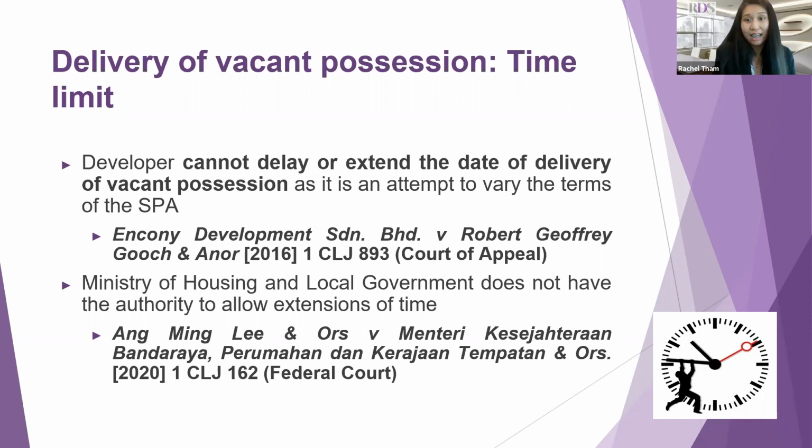The Federal Court held that the controller of housing does not have the power to grant such an extension to waive or modify the terms of the SPA in the statutory forms, be it Schedule G or Schedule H. Such an application for an extension of time is void as it would exceed the powers of the controller under HDA 1966. Hence, the developer must deliver the vacant possession within the agreed timeline stated in the prescribed SPA.